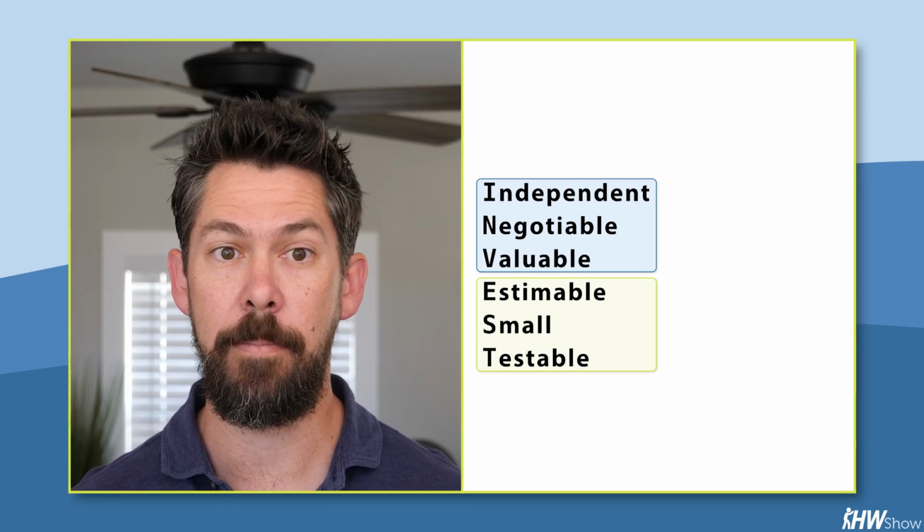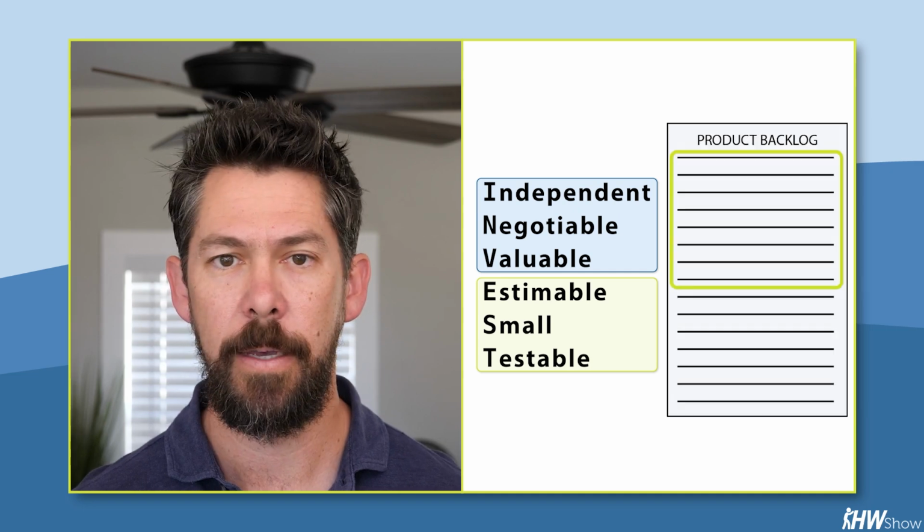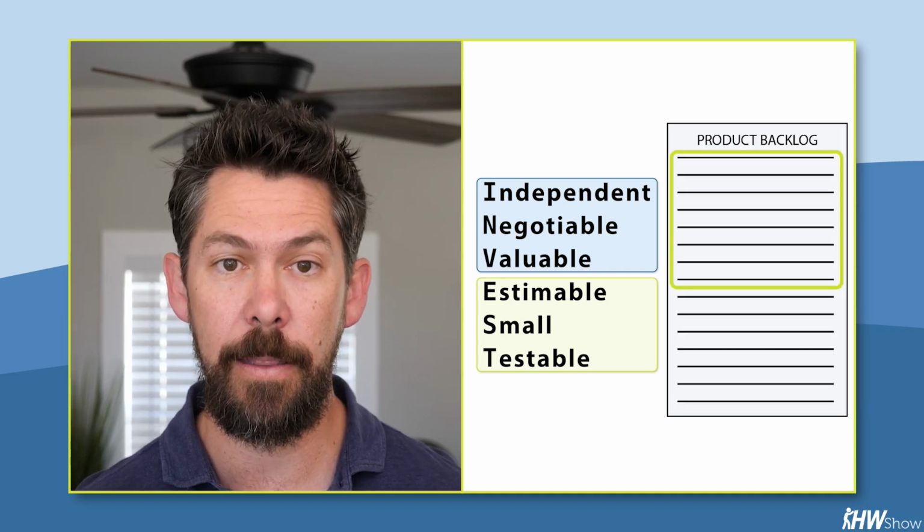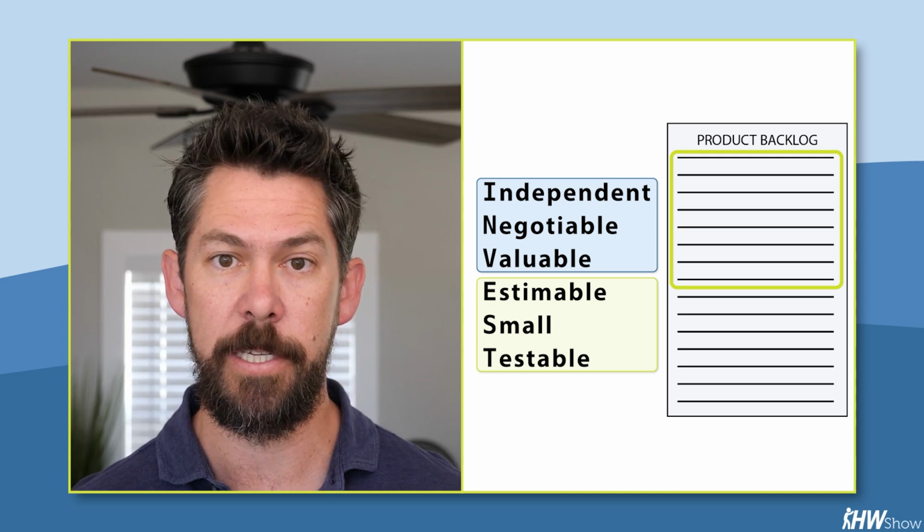Briefly, EST matters more at the top of the backlog. It's the time when our team is trying to make concrete plans, so we care a lot about things being small enough to fit into a sprint.